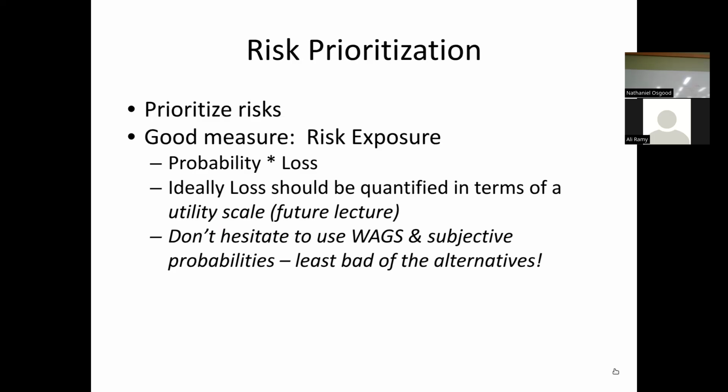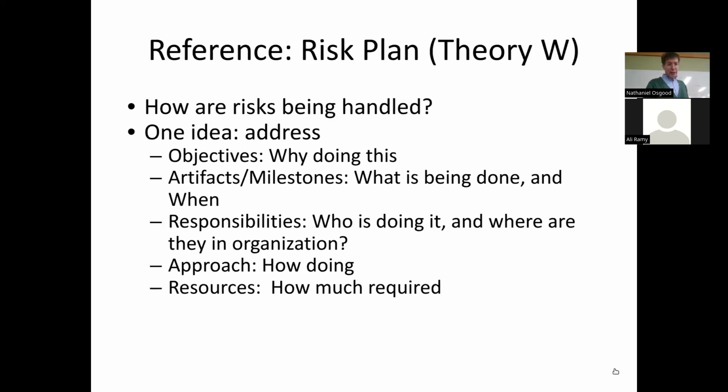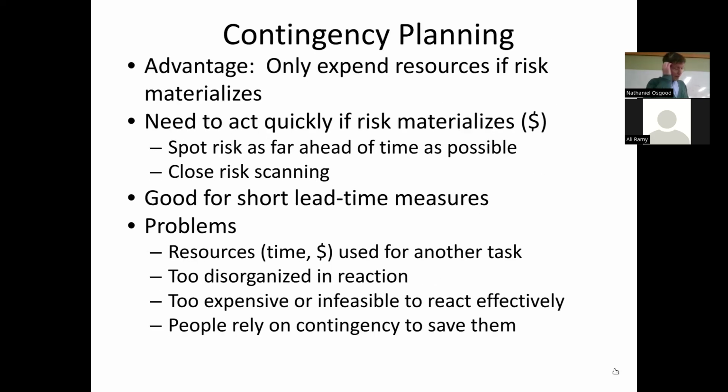So you need to consult with people to get a sense of the probability it will occur, and sometimes even for how bad it would be if it occurs. And you take the multiplication of those as an idea of its expected value. How bad is it overall?